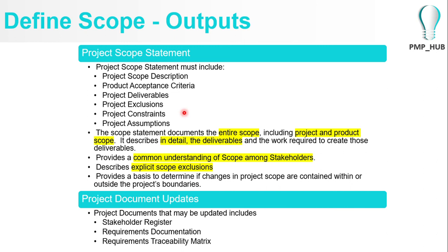Your requirement documentation can also have amendments, since now we are trying to compromise on certain things and come to a middle point. So your requirement documentation will start changing, and the traceability matrices will start changing. Basically, new stuff will come in and certain stuff will go out, so the requirement traceability matrix, who said what, will start getting changed.